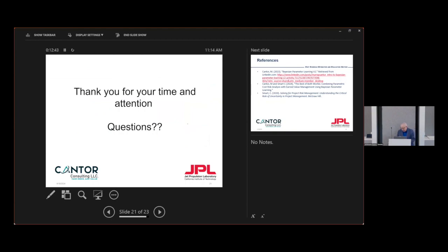What happens with dependency, we've actually built adapters for that product, and then it was sold to a company and they didn't implement it. So I'm trying again. But what you do is essentially a dependency-informed Monte Carlo simulation to roll up the dependencies in the complex model, the various end-to-end. So we have those algorithms. Okay, so that gives you the distributions you're looking for. Yeah, and it gives you a distribution for the total budget and the total schedule.